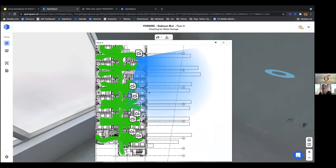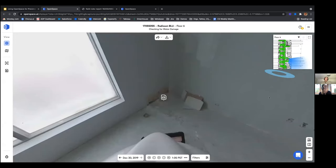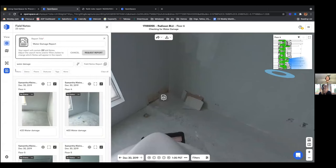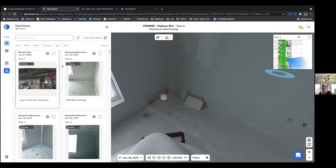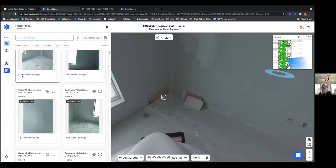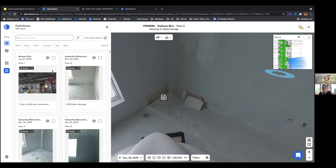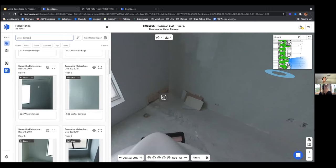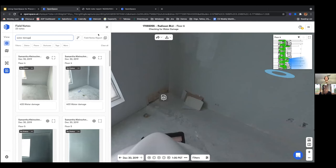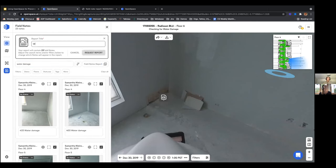You can see the field notes scattered about the mini map, so anywhere on this floor plan you can see where there's water damage that needs to be fixed. You can come over to the left-hand toolbar, click on field notes, and get a list of every field note created for your project. Typing 'water damage' in the search bar filters the list, and you can generate a field note report by hitting the field note report button.